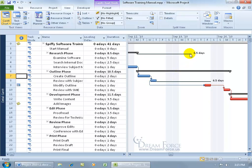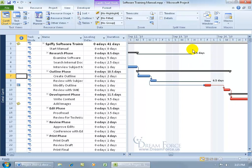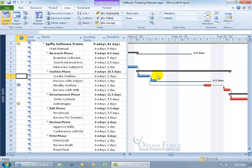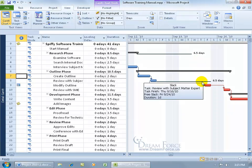this one finishes on Tuesday before it becomes critical because we've got one, two, three days. And that's what we've got here. Two plus one is three. So you take into account that after these tasks, or that phase, finishes on the 21st, you add three days, it hits the 24th.